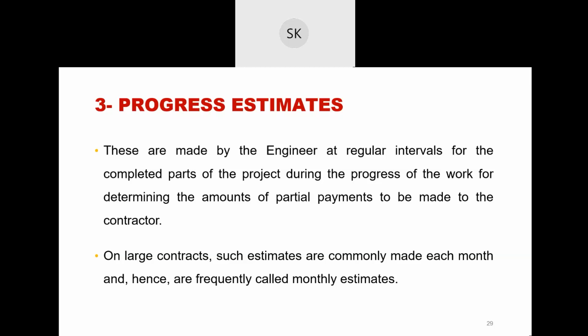He cannot make it 1,000; it will be like 700. It may increase or decrease a little bit, but he cannot make it 1,000. So based on the BOQ provided by the government, he will make the bill, submit it, and get the payment in partial, in three or four intervals. It depends on communication between the contractor and the government department.